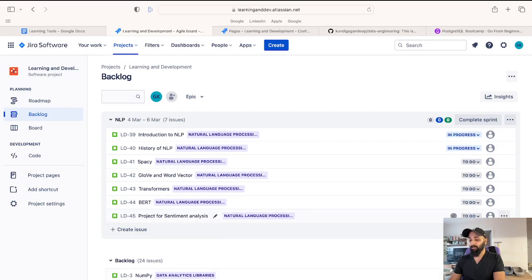And these right here, small, are the story points. And story points, you can think of how much effort it'll take. So let's say I want to spend 5 hours on this. So I can essentially add the number of hours. Different teams use it in different ways, but you can use it in, let's say, number of hours or even number of days. So let's say I want to spend like 1 day on it, but it's only me who understands. And since I'm the only one, it's going to be assigned to me, of course. I don't know why it's not working. Anyways, so you can see these are the topics which are in progress, and these you can see in board.